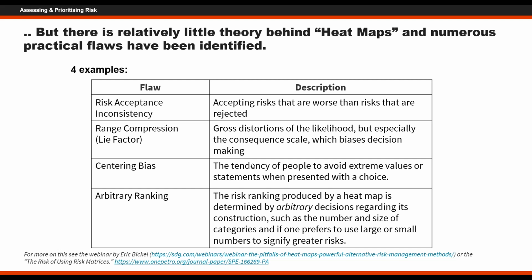One of the flaws that's been pointed out is an inconsistency between the rating of the risk. If you do your rating on a heat map, and at the same time do quantitative ratings in terms of something like expected losses, what you will find, not infrequently, is that a more severe risk in terms of its expected loss ends up getting a lighter rating, so it might be a yellow, when something that has less impact or less overall loss in expected terms ends up being a red risk. And there are certainly clear cases where the paper and the webinar can demonstrate that.